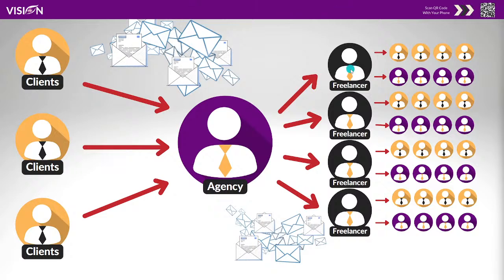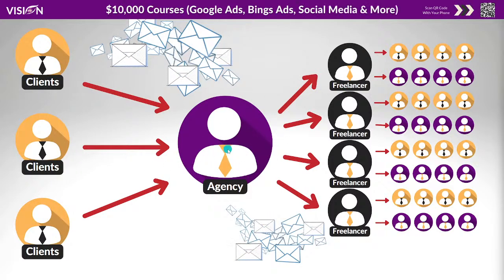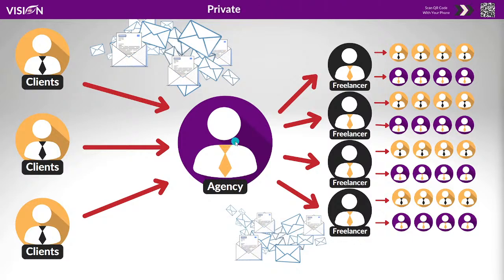So if the freelancer's smart, they're going to charge you for the additional changes in the email. Okay, that's really important. If you are a freelancer, you need to remember that when you require all of the changes in one email, you need to stick to that, because it's going to take you extra time if you do not.